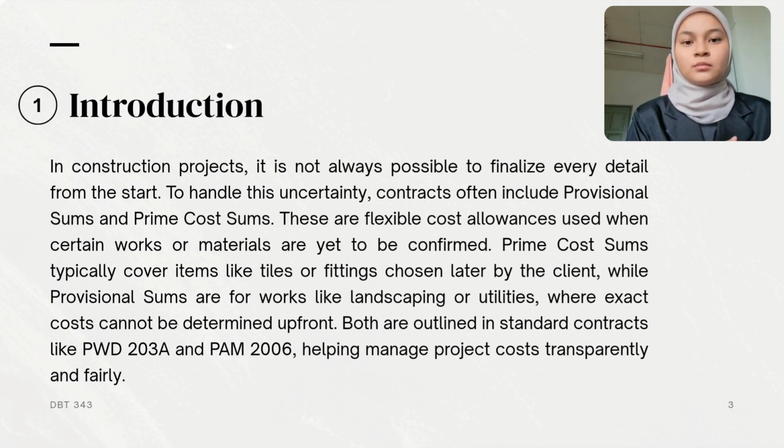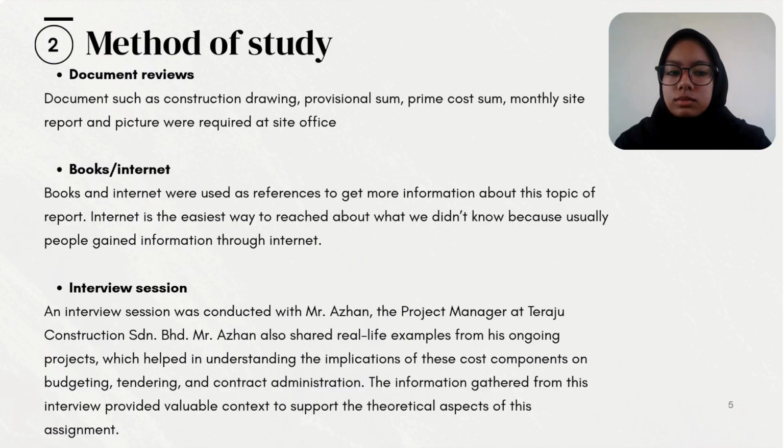Provisional sum are for works that are hard to price early on, like landscaping and utilities. These are rough estimates which will be updated later when more information is available. Both are explained in PWD 203A and PAM 2006, and they help keep project flexibility while managing risk and responsibilities.